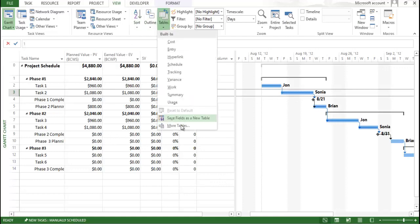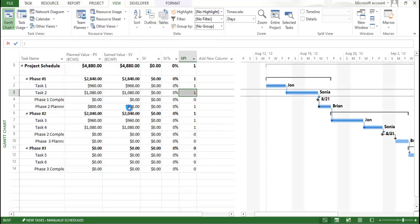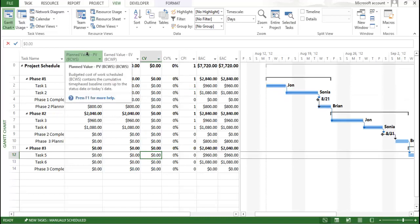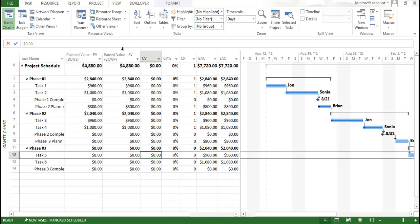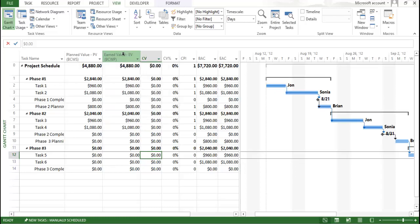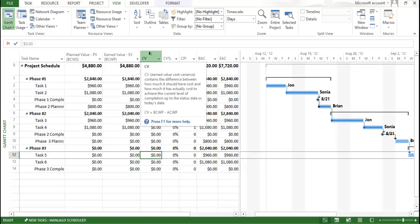Now for cost variance, go to Table, click on More Tables, and click on Cost Indicator, then Apply. You will again see Planned Value — the base cost that was planned. Earned value here is the same: the Budgeted Cost of Work Performed — whatever work was performed up to the status date, based on the task, resource, and assignment with respect to the actual physical percentage on site. That is called the earned value.